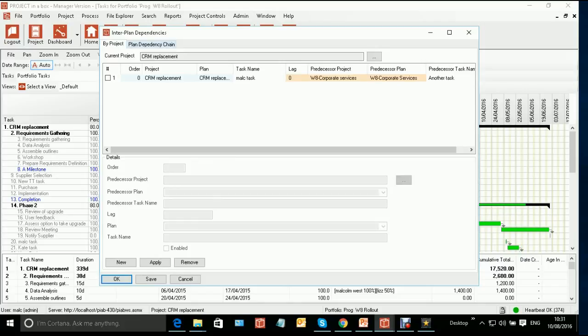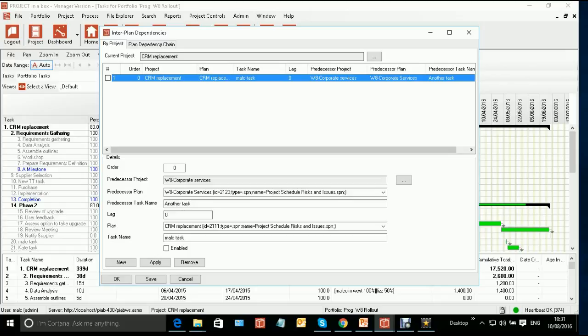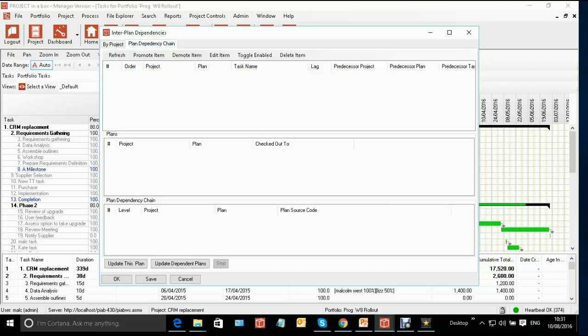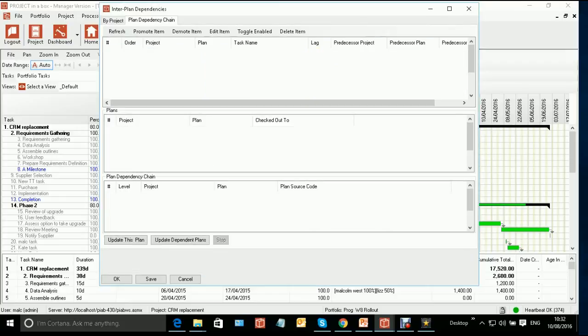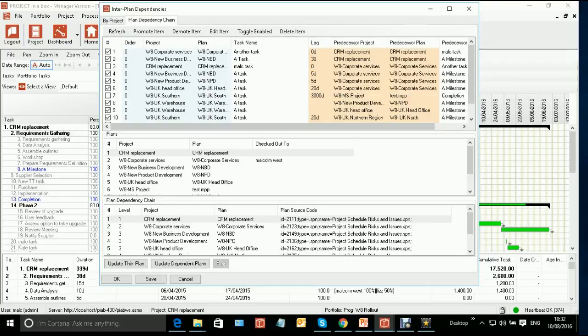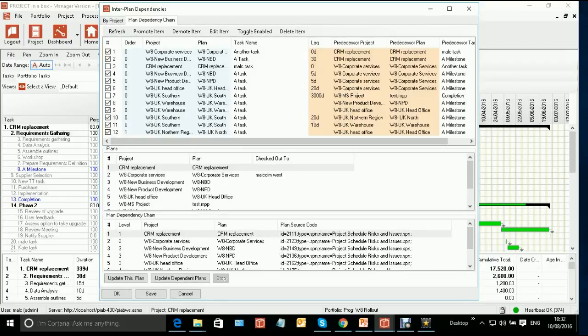So this is in two parts. The first part is the same as the simple create dependencies form, and you see the dependencies for the current project. There is one that applies to this project, but it's currently suspended. It's not actually active. Now, if we go on to the more interesting plan dependency chain here, and I just refresh that, you'll see what we've got is a set of dependencies, some active, some suspended, between a set of projects.